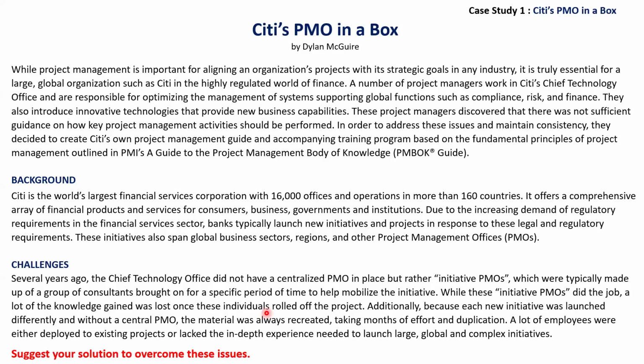But what they have done is they have created this project management office in a written format. Since the Project Management Body of Knowledge developed by the Project Management Institute is general, they have developed their own body of knowledge specific to their projects. That's why they named it project management office in a box. It's like a manual that contains everything from the beginning to the end of the project.